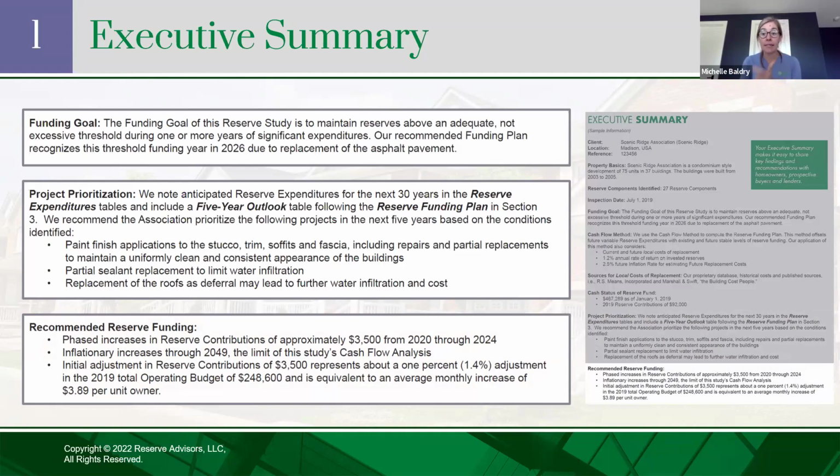Again, in Virginia and DC, best practice, so this is what you should be following. Maryland, you have to. So if you're located in Maryland, you have to do the reserve study and then you have to fund it. Where in Virginia, you just have to disclose it. You got to do it, you got to disclose it, but it's the board's direction. They can decide if they are going to fund it or not.